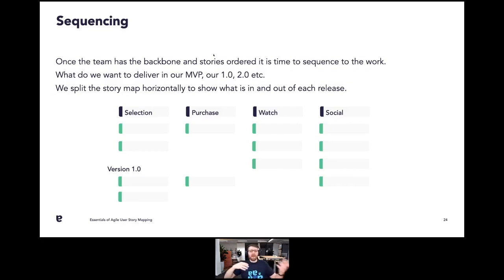Are there any other ideas that we had overnight? Are there any other activities that we thought of, user stories that have come up? And then we'd go through and we'd do the estimation exercise, and we'd actually order these things and sequence them. And so obviously, if you're thinking about a Kanban team, you might be sequencing them into versions of work, like what's our must release for our experiment to go live, what's our version 1.1 potentially look like, and so on and so forth. Or you might be doing this on a sprint by sprint basis.